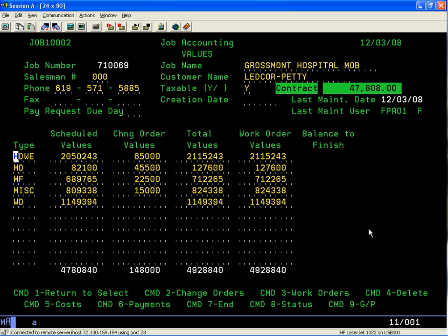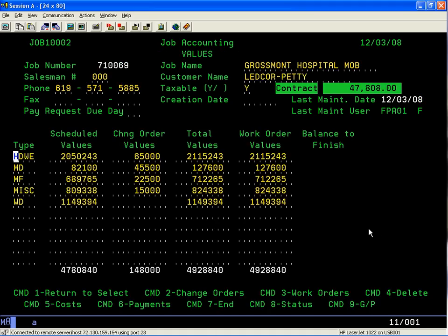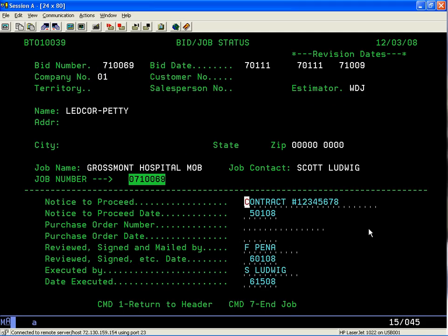I'm going to do an F1, and I'm back to the original screen. F9 shows us what our gross profit percentage is based on our schedule of values. As you're accumulating this information, generating work orders, and shipping materials, job accounting will keep a running tally of where your profitability is on this job, which I personally think is a great tool.